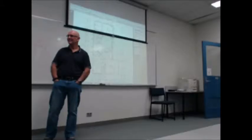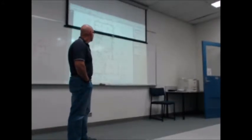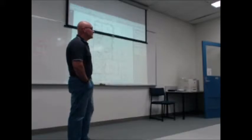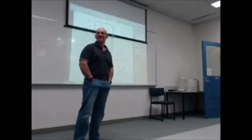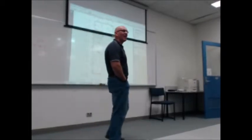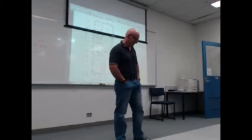Had to replace the door. Extra charge for them, new door, new labour, everything else. So did you wear that, or they paid? No, they paid because I had it in writing. And yeah, I told them ad nauseum, it is a stupid idea.